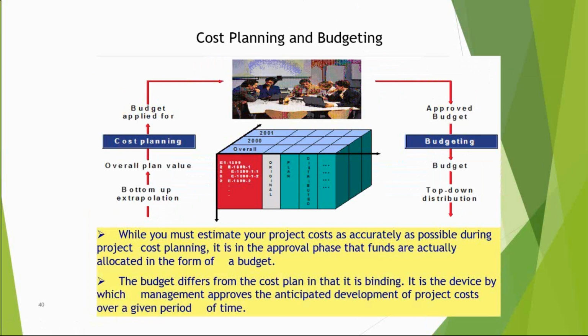Always, I told you, and I'm repeating, budget can be assigned only to WBS. Got it. The WBS has to take care of its networks and activity cost, and it has to distribute its budget accordingly. We have to assign budgets only to WBS, and we cannot assign budget to networks. The system will not allow you. The system will not give any option to assign it.